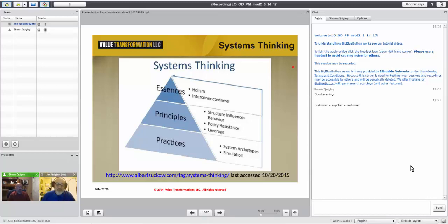You're planning the second project, the very first thing you should be looking at is, hey, getting 15 people into the room caused this problem. If it causes this problem, let's group it down to 6, 5, 3, or whatever, and you can keep working on it. That's an example of loop learning and lessons learned. Yeah. You know this is a problem, so you correct it.